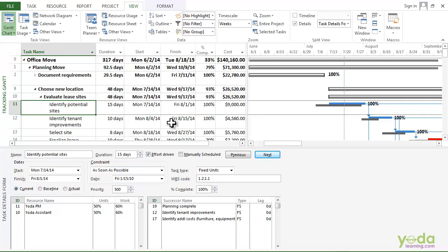Now scheduled values when you first start are the forecast for your project. Basically, it's the plan that you are developing. Then once the stakeholders approve your project, you want to save those scheduled values to your baselines. Basically, you take a snapshot of your forecast and turn it into your baseline. That's the target you are going to aim for the rest of the forecast. When you save a baseline, it saves the start and the finish dates, duration, work and the cost.